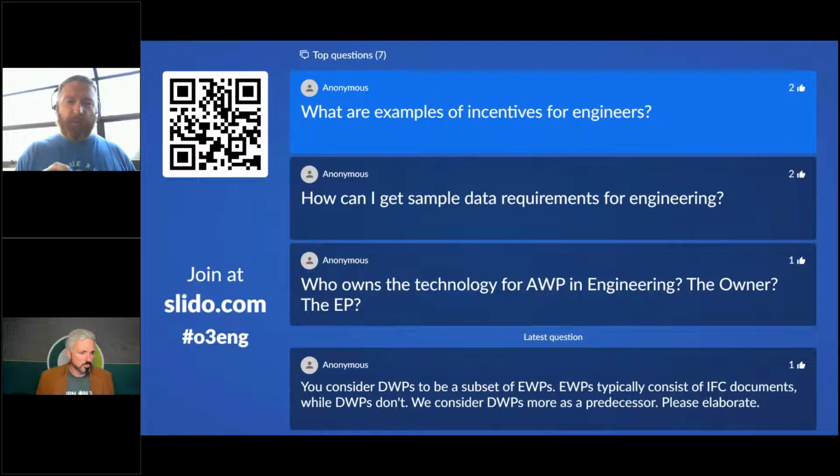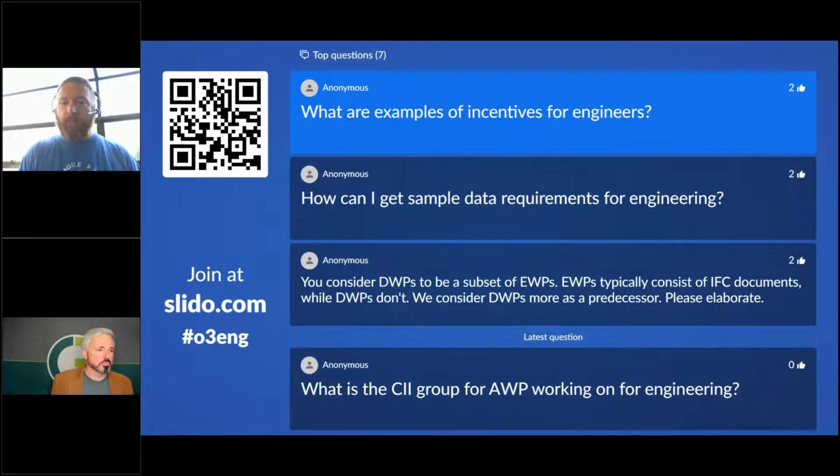For example, a lot of times engineering contractors will be paid their cost, and then the fee is the thing that's held at risk based on that schedule completion and the timing of completion of incentives. So everything can be quantified, everything can be based off here's what we should be and here's where we actually are. And owners should be able to find very, very good ways to tie that.